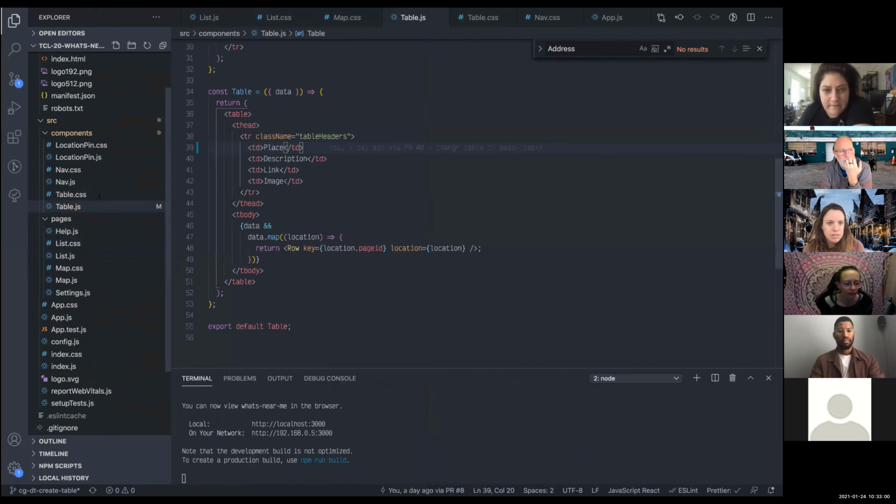So scope creep. Had we had all this scope in the AC, it might have made sense. Maybe those stories would have been too big. We haven't really had a talk as a team about what a right-sized story is, but we did talk about right sizing back in the first meeting. My team at Zapier, we want things to be done in about 3 days, and that's our expectation. If that was what we were aiming for here as well, then these stories are probably a little bit too big.